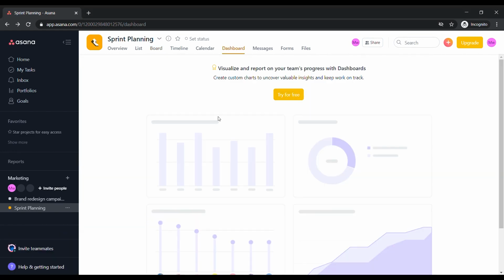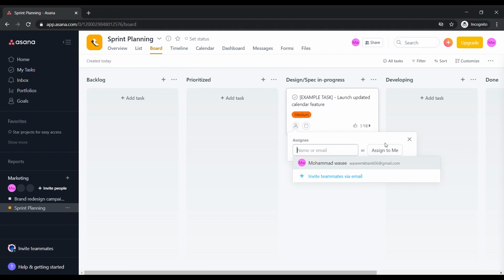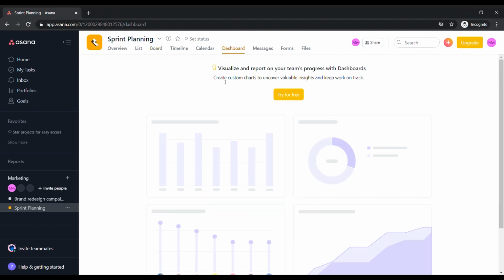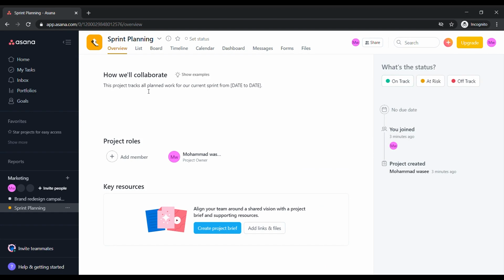The easy access and visibility across all channels make it worthwhile and efficient for the whole sprint planning process. The best practices for any sprint planning include going over backlog items to maintain continuous improvement in the sprint all along, determining ownership of the tasks so that the work is not hampered at any cost, confirm team velocity and capacity to ensure the proper functioning of the teams during the sprint. After the successful sprint planning meeting, you can go ahead and start your sprint.